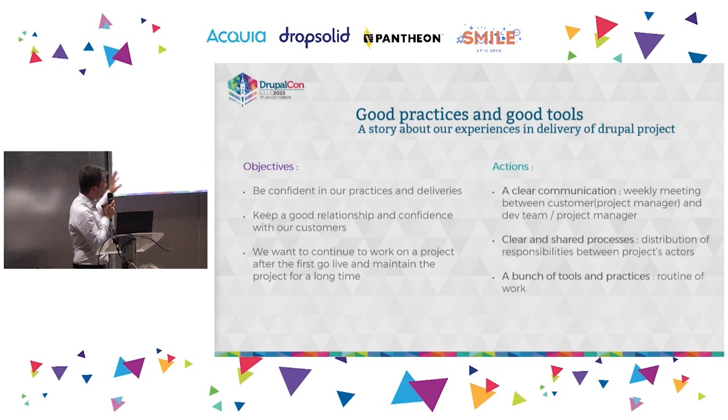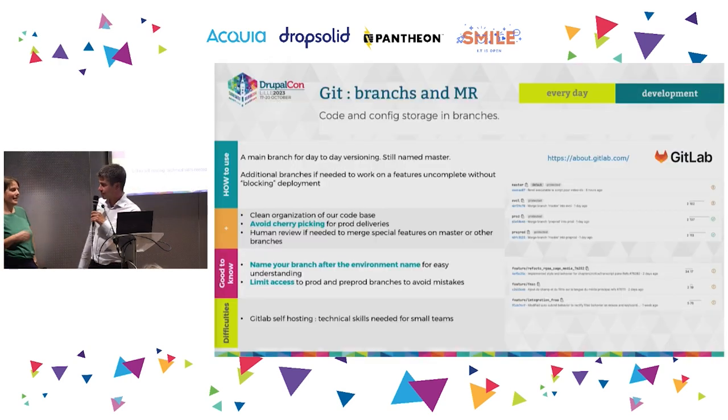Some actions need to be taken right from the start, such as clear communication. Maybe it's evident for you, but we do a weekly meeting between our project manager, the customer project manager, and the dev team. We need to have clear and shared processes. That means that every responsibility has to be detailed and attributed to someone, so you know what a project actor does in the project. And then finally, which we will detail right now, a bunch of tools and practices to establish a routine of work. The more routine you give to the whole team, the more quality you bring, and the more confidence you bring. So now I can let Anne-Sophie present our collection of tools with Francis.